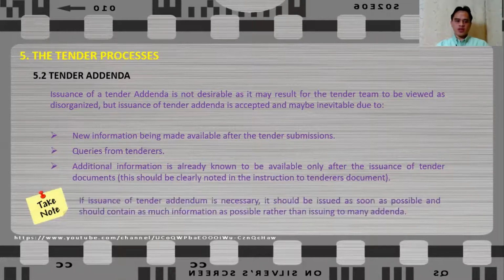We have to take note that if the issuance of a tender addendum is necessary, it should be issued as soon as possible and should contain as much information as possible rather than issuing too many addenda.